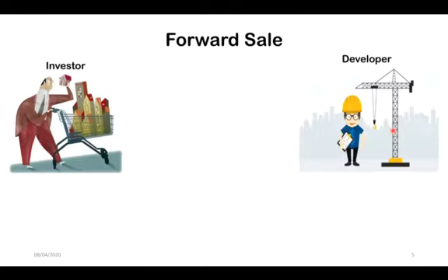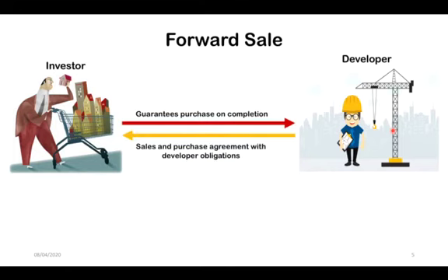With this form of funding, an investor gives a forward commitment to purchase a development on completion once agreed conditions have been met with regard to specification of the building and its letting. Contrary to a forward funding transaction, here the purchase price is however generally paid in full and not before completion of the development, with the developer funding the construction cost itself.